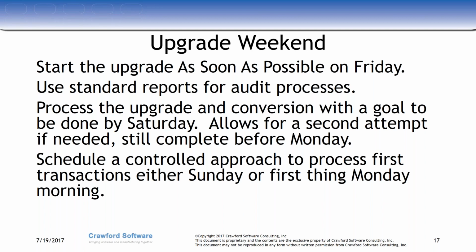The reason why we want to use standard reports is there's two things potentially wrong with using a custom report for this validation process. One, it's a custom report. As we said, everything has to be rewritten. If it was rewritten improperly, you could get $1.5 million on that custom status report, but it's because it's using the wrong costing data. It's using the wrong quantity data. So you want to compare apples to apples.